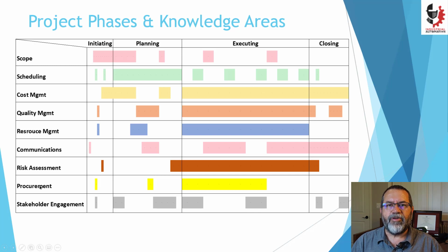Down here on procurement, procurement is another word for purchasing. That might be looked at a little bit during the initiating process, maybe looked at again during the planning process, and then during executing, that's when really all the purchasing is done. And hopefully when you're closing out a project, you're not still buying things, so it's not really involved in the closing phase.